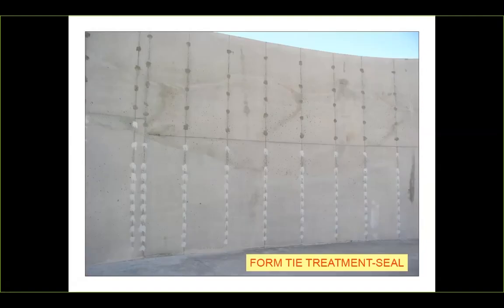If you have a 14-foot wall and they're placing concrete in 8-foot lifts, as they progress through, or when they remove the forms, you're going to start seeing where the concrete started to set, and you're going to start having cold joints develop in that placement. So follow the specifications if you're doing quality control on site.